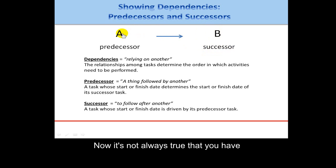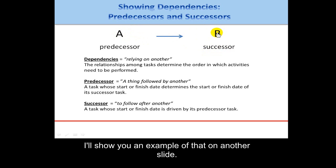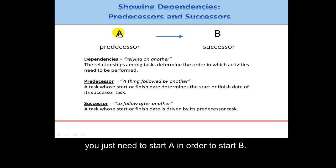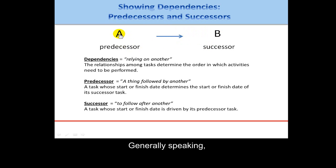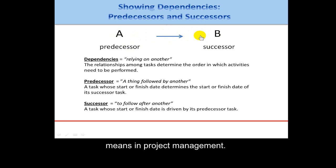Now it's not always true that you have to completely finish A before doing B, and I'll show you an example of that on another slide. Or it may be that for some tasks you just need to start A in order to start B. So dependency relationships — the predecessor and successor relationships — have a few dimensions, but generally speaking, this is what dependency means in project management.